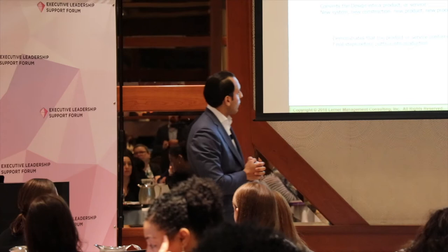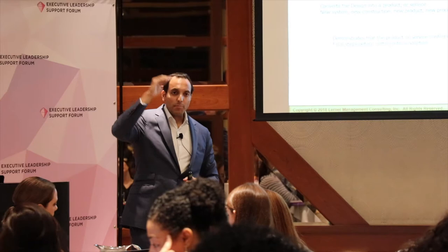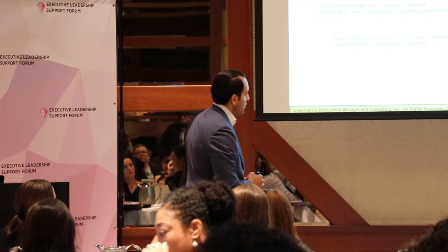That's your build. And then before you go live, you have to do what? You have to test. And based on the requirements that you collected back in the analyze phase, you want to make sure you're testing every single requirement right before you put that into production. Okay. And then finally, you close out. Every project needs a good close. You're closing out the contracts. You're doing all your documentation. And one of the most important deliverables in this stage is what we call the lessons learned.